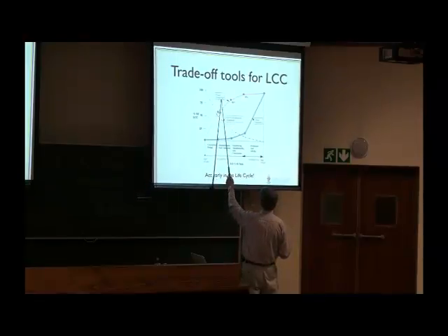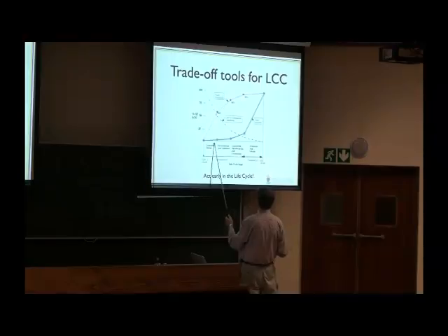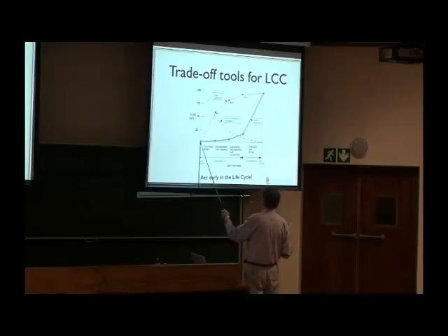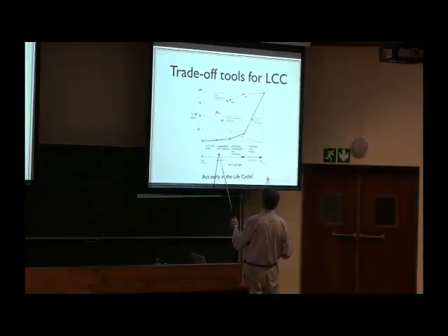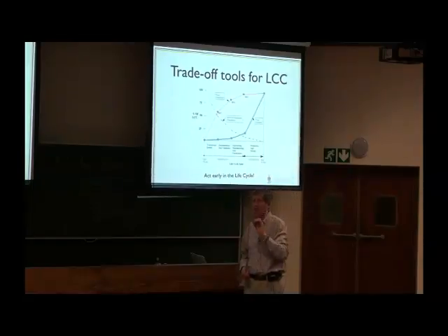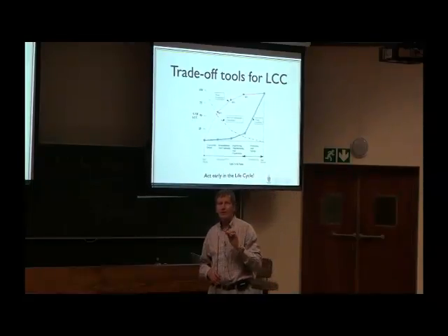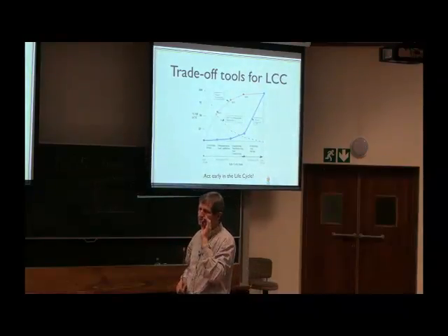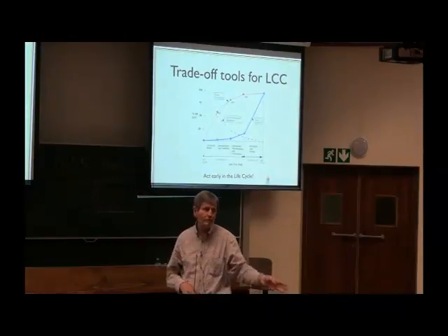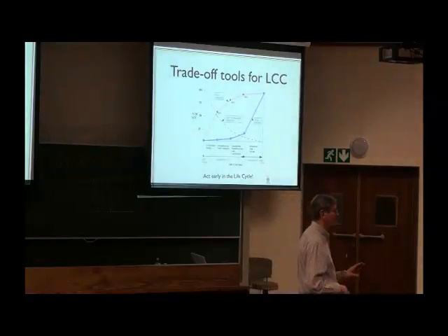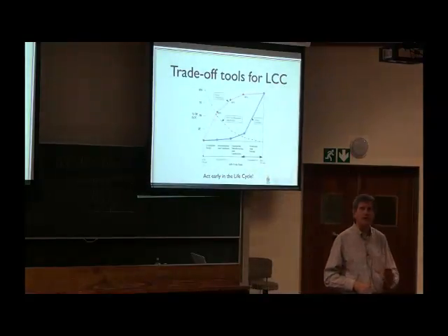This is the funds committed. So we say that when we start designing a system, of course you've committed no costs, nothing. But this graph says that by the end of the conceptual design, you've already committed 66% of your life cycle cost. Your total life cycle cost is committed. In other words, you can do nothing about it anymore. It's finished. Past deal, gone. Don't have that opportunity anymore. So that first 66% you decide during the conceptual phase of your design.